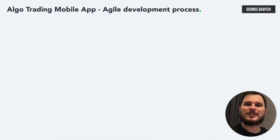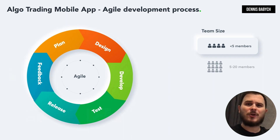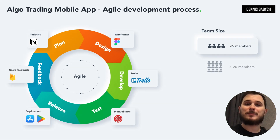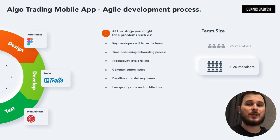Let's talk about the agile process — a great methodology that can increase your development speed and efficiency. But in some situations it can actually decrease project progress speed by up to 30%. For instance, a team of five developers who know their responsibilities, communicate effectively, and have developed most of the product can have a highly effective process using simple tools like Trello, Asana, Google Docs, and brief meetings. However, as a team expands to 15 or more people, unforeseen issues may arise, such as key developers leaving the team, onboarding becoming complicated and time-consuming, team productivity decreasing, communication problems occurring more frequently, deadlines being postponed, and the quality of code and architecture going down.